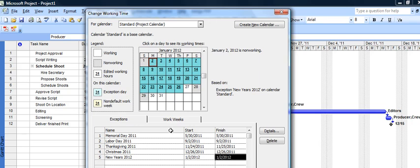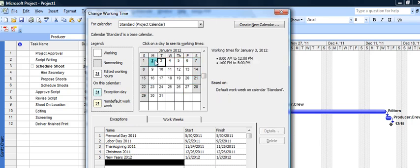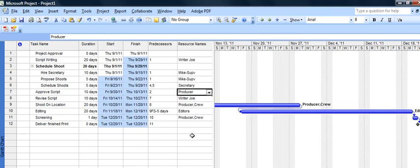Now the second is grayed out, so now our calendar will actually be extended. So our due date, if we were planning on working across that time, those are non-working days, so the completion date of our project will change based on all that. But we want to be as realistic as we can in our plan. If we know we're not going to be working certain holidays or certain events, then we should go ahead and block those out of our schedule and not expect that we're going to be completing that work.